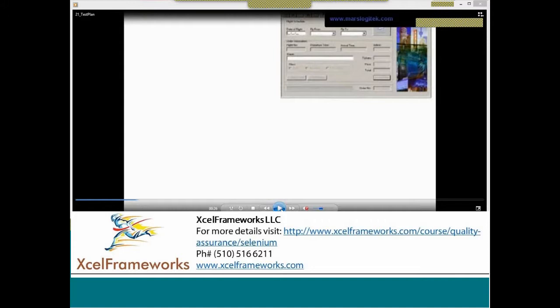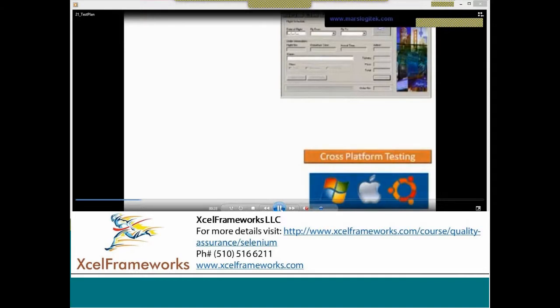Based on this feature understanding, I believe performance testing is not required. It depends upon the situation, it depends upon the cases. If performance testing is not required, you can clearly shoot out a mail or put in the test plan that we are not going to execute any kind of performance testing. Or sometimes it can happen that we are not going to do cross-browser or platform testing. We have limited resources, so we will verify our product from QA only for IE8 or IE10 or Mac or whatever.